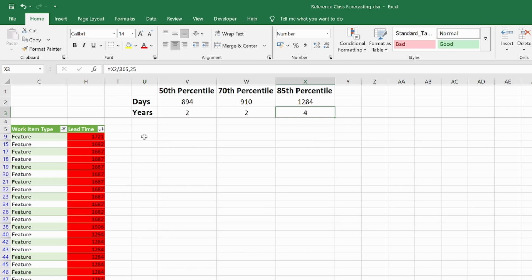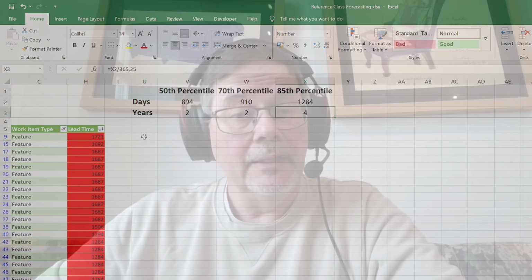Now, this can happen in organizations that use waterfall, agile, hybrid methodologies, and it can happen if you have poorly implemented SAFe, for example. And the reason why it happens is that you lose control over your work in process, which means that work just builds up in queues and doesn't get finished. And that's built into the system. That's it, really. It is that simple. So, is it really this easy?